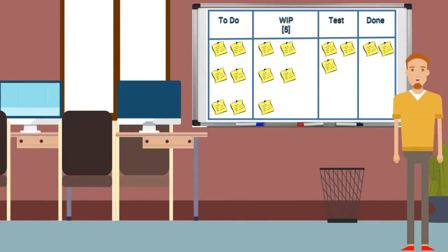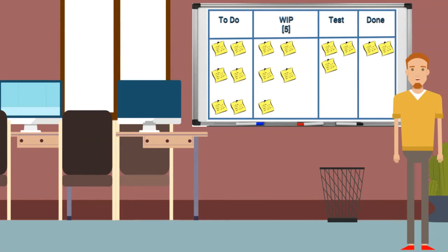On one of the Scrum teams where I was the Scrum Master, we were doing releases every 3 sprints. At one point during a sprint retrospective, the team noticed that we had fallen into a bad pattern where we start a lot of new stories in sprint 1 of the release and not complete all of them. Then in sprint 2, we would even start more new stories. When we finally got to the 3rd sprint of the release, we were mostly just finishing all the stories that we had started in sprints 1 and 2 of the release.